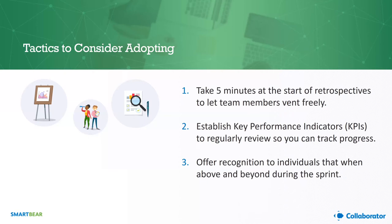Having those takeaways is really important. One way to get to them is by having key performance indicators — KPIs — that you can regularly review as part of your retrospective process. That doesn't mean reviewing 30 different metrics. If you have three or four meaningful metrics your team has decided are important — like the number of defects you're finding, how much time you're spending on code reviews, or how many tests you're running — you can set it up however your team sees fit. KPIs are scary to teams, but when you explain what they really are, they can be as simple as a thumbs up or thumbs down on how the sprint went or on code quality leaving the sprint.